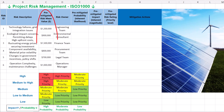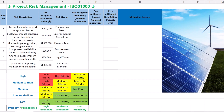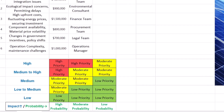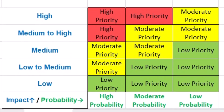For each risk, the estimated cost of all possible outcomes, or value at risk, has been calculated in our risk register. Financial risks have the highest risk value of 1.5 million dollars. The owner of each risk has been identified — for example, technical risks are owned by the engineering team, based on their authority, expertise and ability to monitor, manage and mitigate the specific risk. We aim to use our organization's risk matrix and prioritize risks to find the most significant threats based on their likelihood and impact.